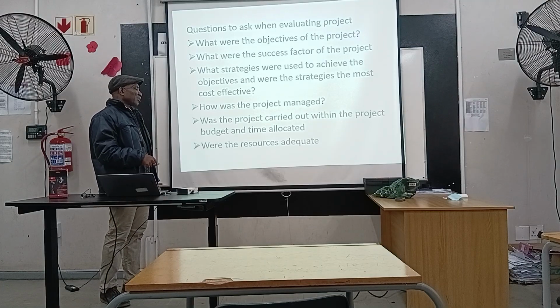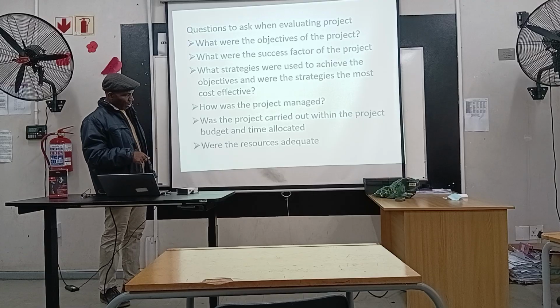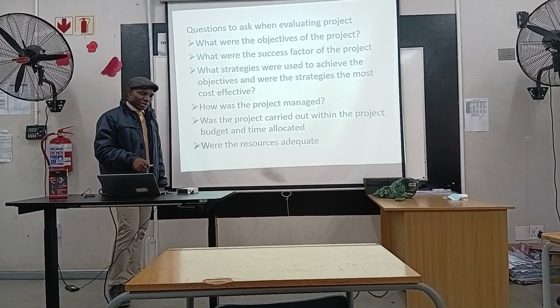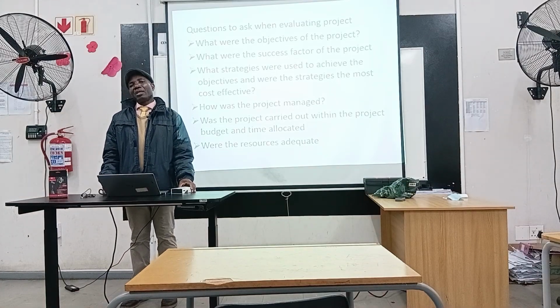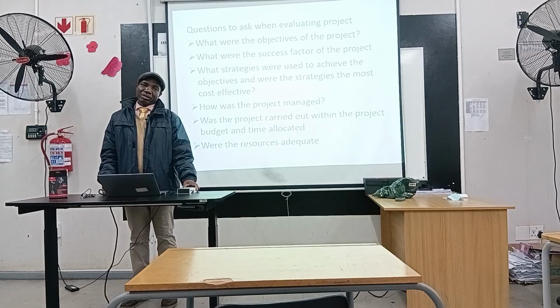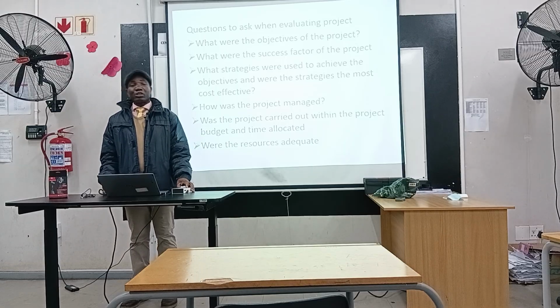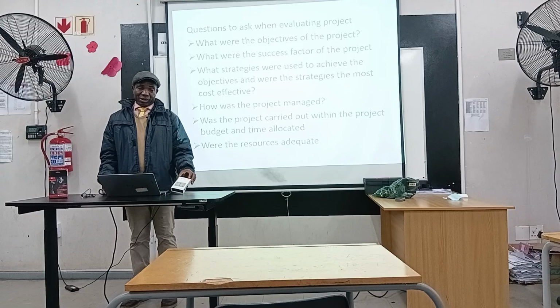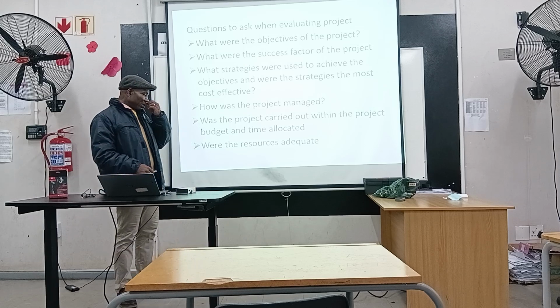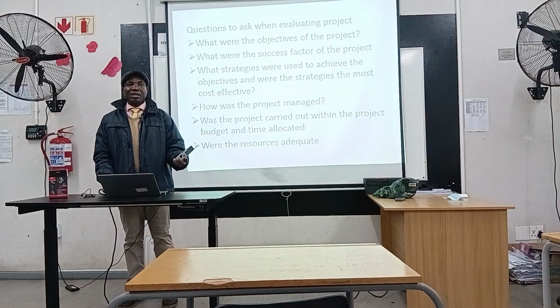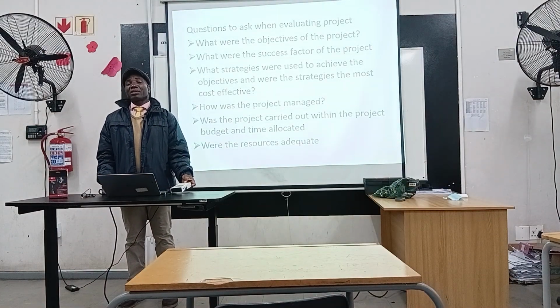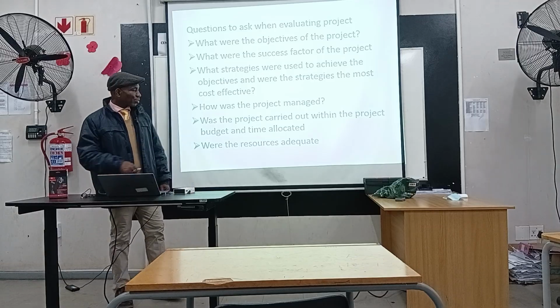Then, were the resources adequate? This is another thing that one needs to focus on as well. Because if the resources were not adequate, obviously it's going to impact negatively on the project. For example, if the resources were not available at the time they should be available, what is going to happen? It will affect the timeline. So all these things need to be considered. If the resources were not available, it's going to affect the quality of the project. Obviously, the quality of the project is going to be compromised.